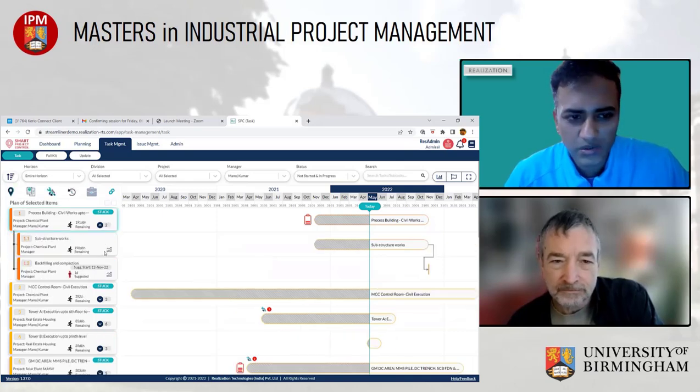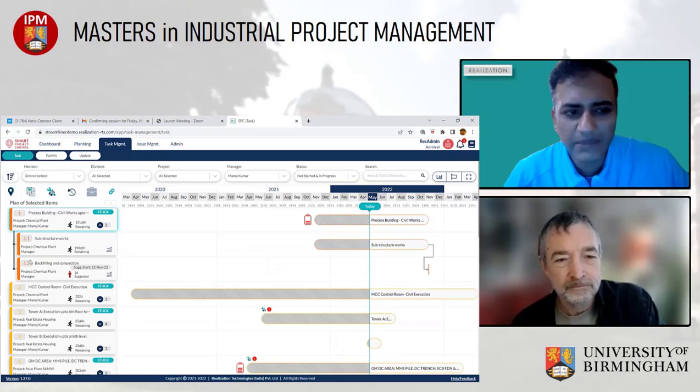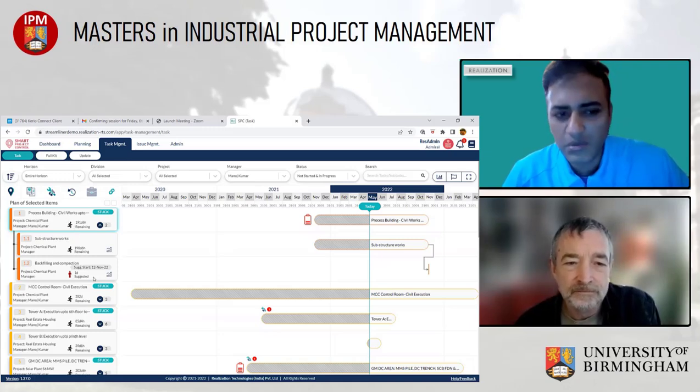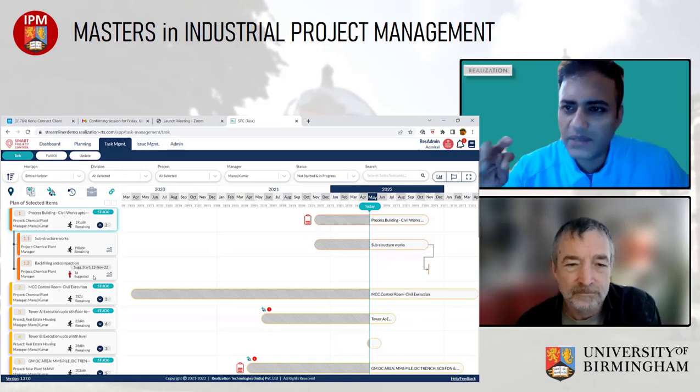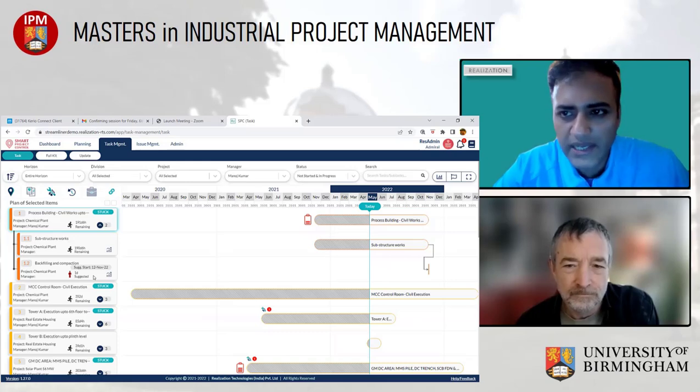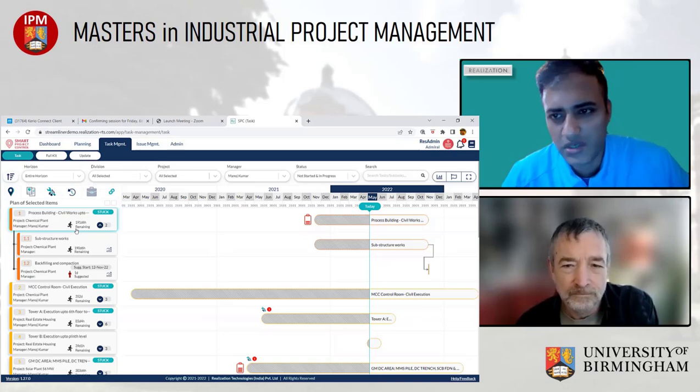If I go down below to the subtask manager level, you can keep distributing the work in the system. So Manoj Kumar can assign 2 managers who are different, and they will see only their subtask in the system. Yeah. So here also, task down, everything is real time. It's only the priority of the batches which are overnight. So whatever inputs we got today, tomorrow the priority might get revised based on the inputs. So that is only overnight. Everything else is real time. So you get to know the duration change in real time. As soon as somebody reports, you get to know. And below also it's real time.